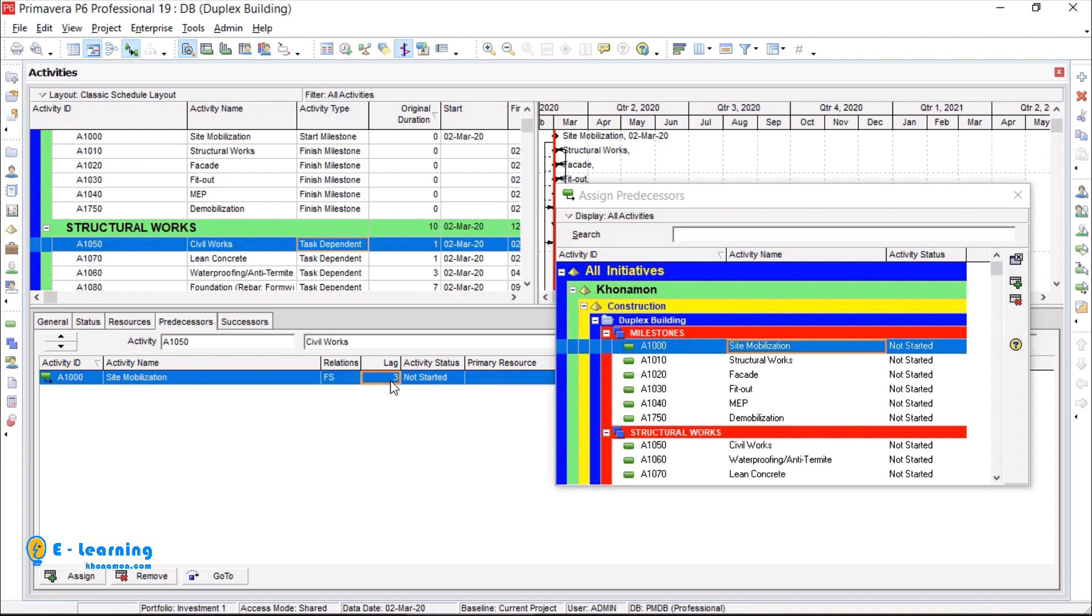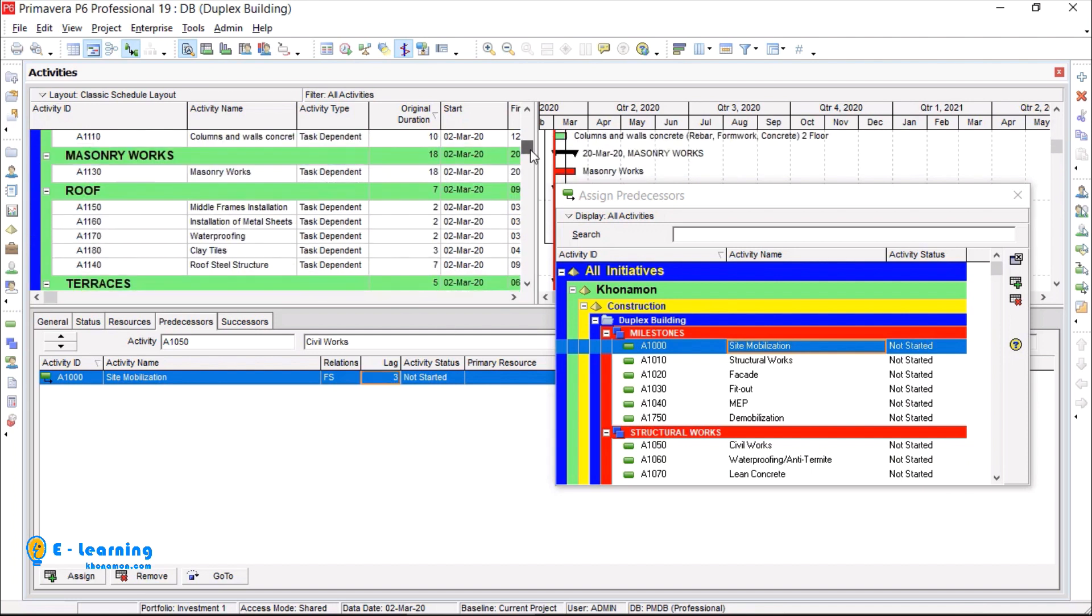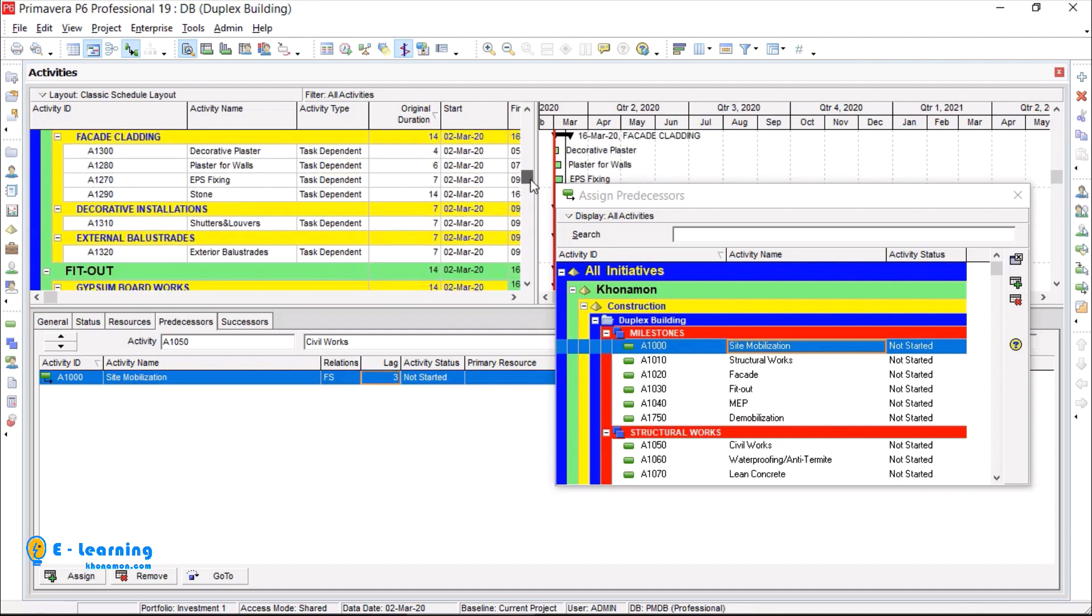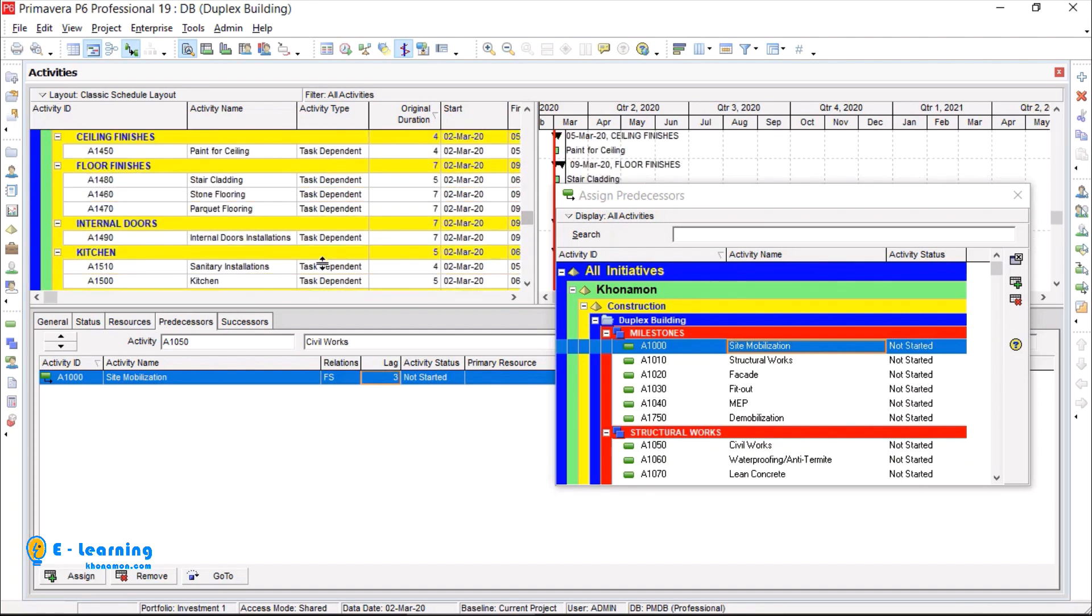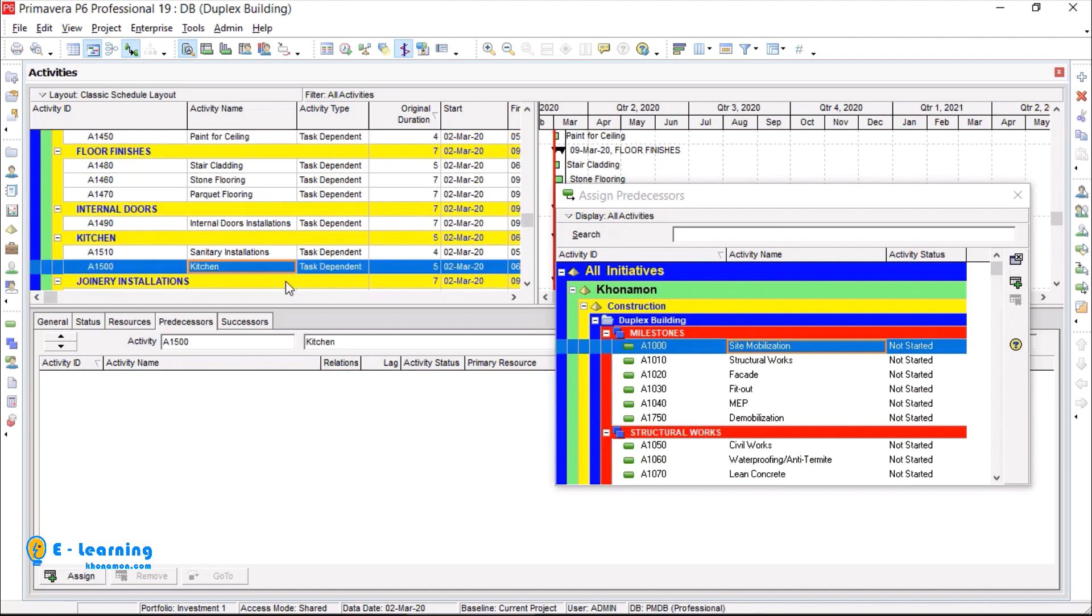We have minus lag also. Let me show you. Kitchen is assigned to stone flooring with FS and minus four lag.